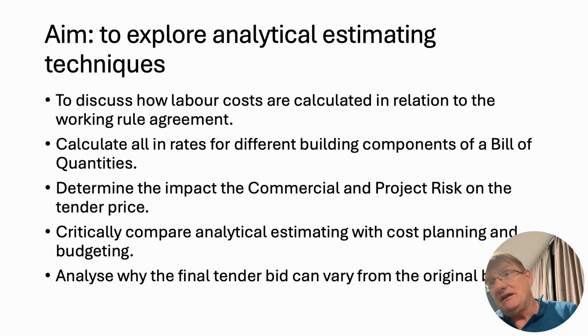It could be, I don't know, £20 a day. But if it's say £20 a day, you've got to reduce that £20 using various studies out there, various constants. You've got to reduce that down to a metre cubed. So everything is always working back to a metre cubed. So there's your plant. You may need a dumper. You may need a pump. All of these things that you need to decide, and that will be based on the drawings and the information that you've got.